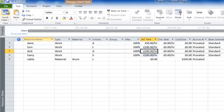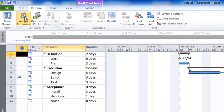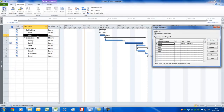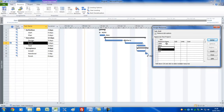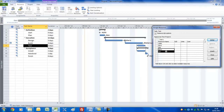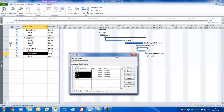Let's go back to the Gantt chart and assign resources to tasks. Click the Resource tab and the Assign Resources command. Click on the Plan task, select Dave, and click Assign — his name appears to the right of the bar. For Design, select Dick and Harry and press Assign. For Build, assign Dick, Harry, and Cable — hold Control to select non-contiguous resources; assign three drums of cable. For Test, assign Tom and Harry; for Install, Dave; for Handover, everyone except Cable.